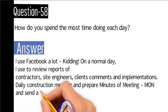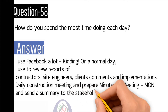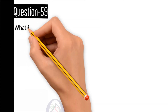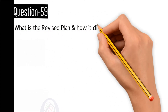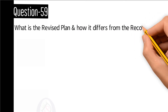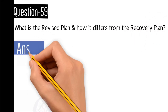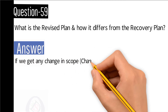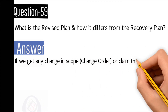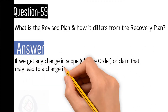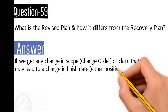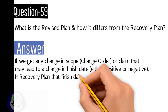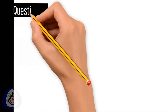Question number 59: What is the revised plan and how does it differ from the recovery plan? Answer: If we get any change in scope, a change order, or a claim that may lead to a change in finish date — either positive or negative — that is the revised plan. In the recovery plan, the finish date is fixed.